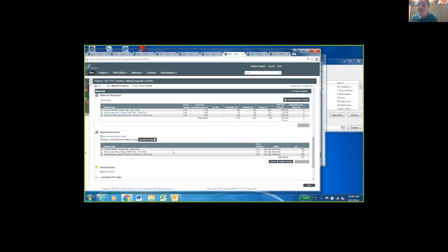So if I actually had plant material at the cooler, this pick slip would go there. We'd scribble all over it and say, hey, this is actually pulled. And then the morning that whoever's at the cooler meets this pickup, they can log directly into the computer, compare the signed pick slip to Terramet, and as long as there is no change, they'd hit accept, and then that plant material has physically left our space and is also transitioned in status in the system at the same time.